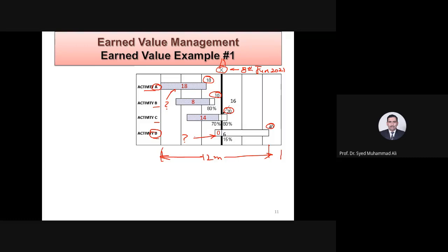अच्छा चलें, ठीक हो गया, मुझे अंदाजा हो गया। याद रखें कि जब आप किसी भी एक्टिविटी को MS प्रोजेक्ट में डबल क्लिक करते हैं, a dialog box opens and it asks how much percent it is complete. You put the percent and it can be a hatch. You can change the style. You can make a small strip inside the main big strip. So there are a number of different ways of doing it. Sometimes it can be solid hatch, sometimes partial hatch, it can be a small barik thin line inside that. So there are many ways of representing it. But the point is it shows you the progress.